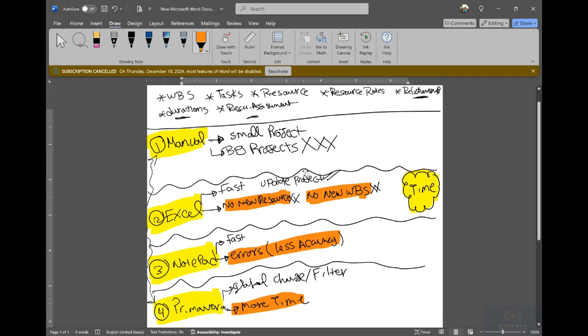And one question came to me about the labor cost. Labor cost or company labor cost is not fixed. Some companies, because it's a combination of direct cost and indirect cost. The labor is receiving salary plus bonus plus overtime plus some cost related to iqama and work permit and the card and like this, and the renewal of iqama and the visa and like this.